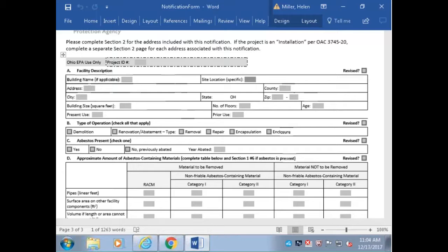Did I hear correctly that this form must be used after December 21st? Yeah, we think you should be using this form after December 21st. Obviously, like we mentioned, for any active projects that you still have going on, if you want to still use the current forms to the current places, you can do that up till the end of January 2nd at 5 p.m. But we would recommend you start using new forms, especially for new notifications.